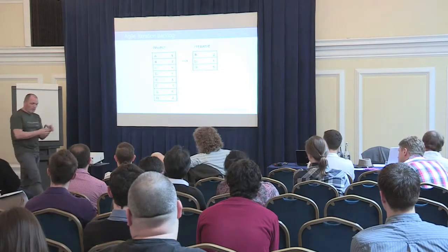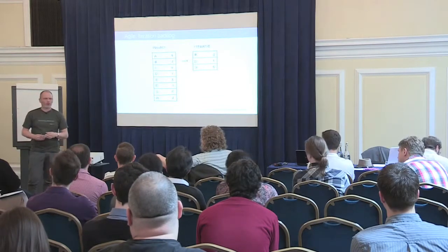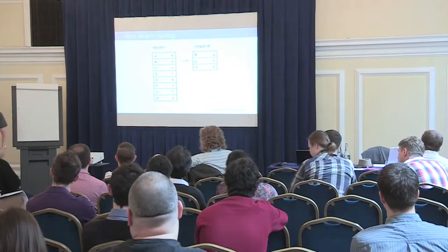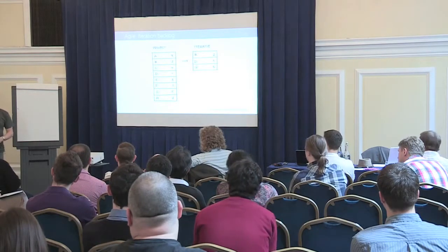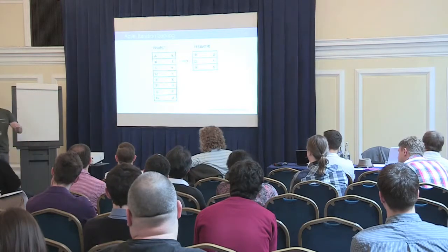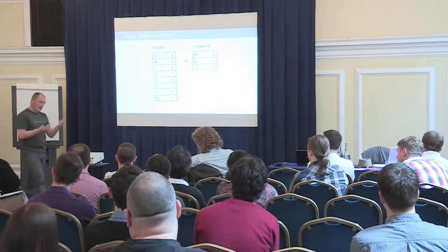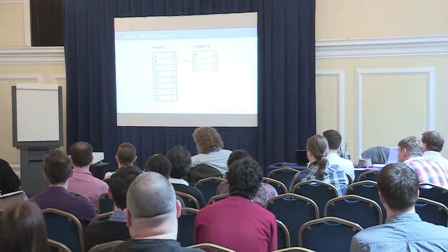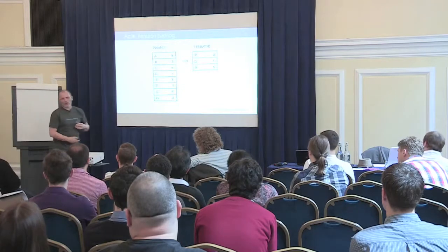What you see is that usually people in organizations have all sorts of other stuff to do, right? Application maintenance and some other stuff, or people walk in the door and say, oh, could you help me out with this? And then the guys on the team say, oh, yeah, we're good in time, so I'm going to help you. And they're away for half a day. And the last 3 days in the iteration, they have to work like crazy to get the stuff done. I've even seen Agile projects where I thought the amount of work that they picked for an iteration was quite okay. And still, every iteration, again and again, they worked over the last weekend, which is totally pointless, right? So that's if you have too little work in your iteration.